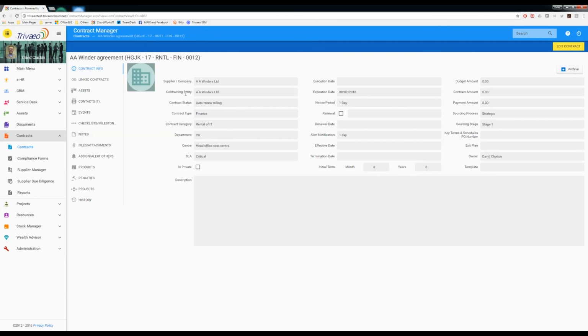Key hint of the day as it relates to contracts is making sure that you get your alerting and notifications set up correctly so that your team can be automatically notified when a renewal is due, when negotiations should start on a renewal, and that you're not attempting to exercise things against a contract when its expiry date is 2 days around the corner.